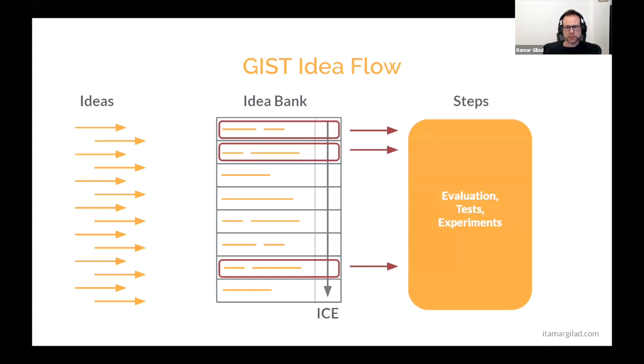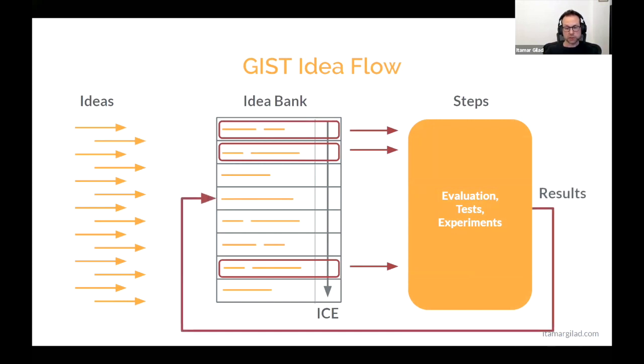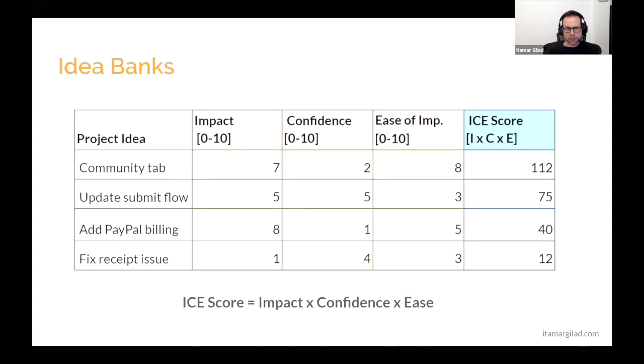And the nice thing about steps is that they generate results. Once we have this result, we can go back and update the I score. That means that some ideas will go up in the prioritization order, but actually most of them will go down, just because that's the statistic. So the idea bank is not just a repository of ideas, it's kind of a knowledge base of learning in this sense.